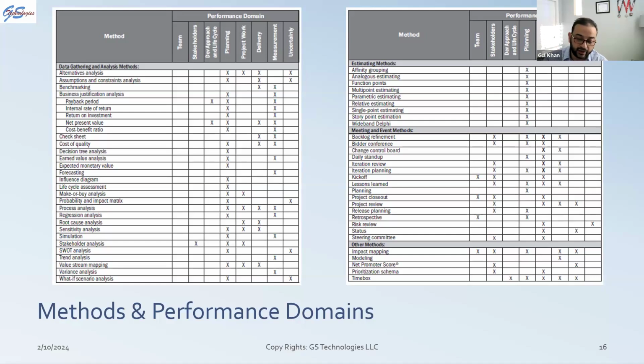If I go back, I give 4 weeks for the final acceptance of the product. Before that, how much time would I need to do the testing? Maybe another 4 weeks, which means from 25th of December back to 25th of November, and from 25th of November back another 4 weeks, that's 25th of October.